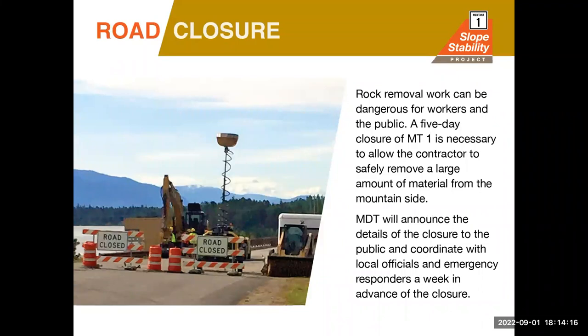The anticipated traffic controls: the highway will be closed to through traffic between Highway 38 and Georgetown Lake to provide an adequate place for vehicles to turn around during that 5-day closure. There are no feasible detour routes available for this section of road. There will be no designated detour route as part of this project. If you have to get through or to the other side of that, MDT recommends going out to I-90 and driving back around to the backside.